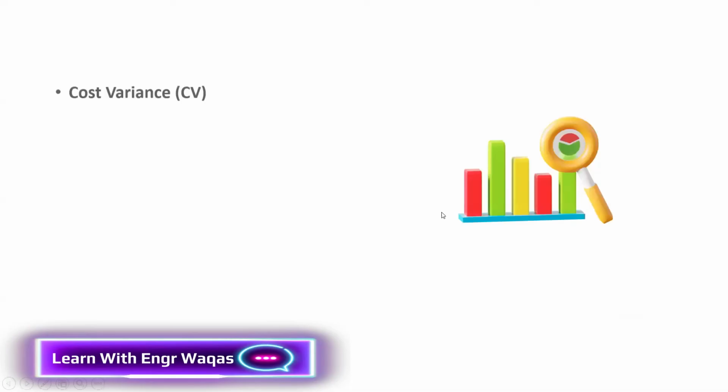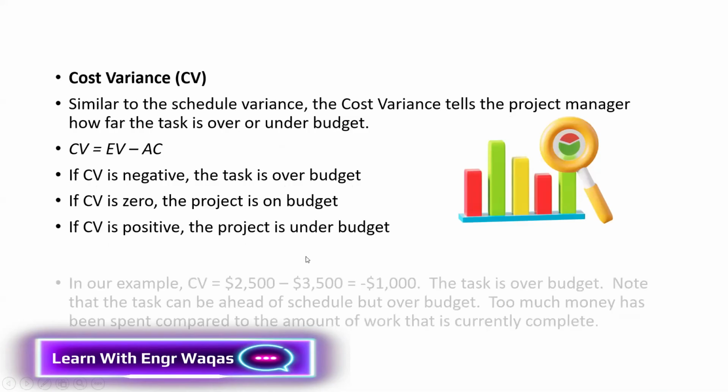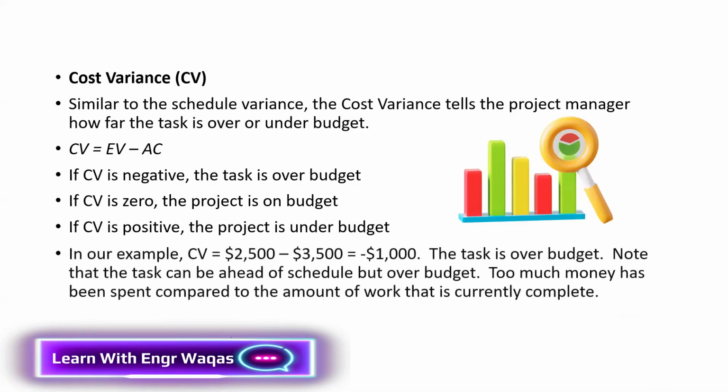And then the same thing, cost variance, as per schedule variance, same formula. But here, see, I will explain. There it is earned value minus planned value. Here you have earned value minus actual cost. Pretty similar things. It's very easy to understand. Here again, a negative value is going to give you over budget.